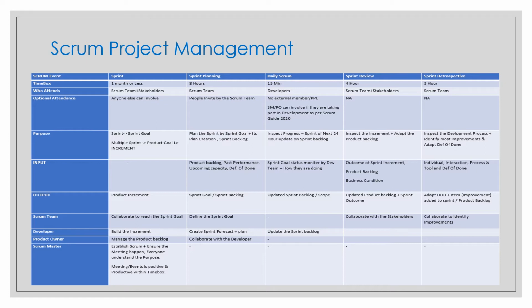So how exactly is the product backlog created and managed? Everything starts with a goal or a vision. The product owner is expected to define an objective that the product should achieve. This is the product goal. The product backlog needs to be aligned with the product goal. In other words, all the items in your product backlog should help you reach the product goal, and the product goal is the commitment for the product backlog and is part of it.